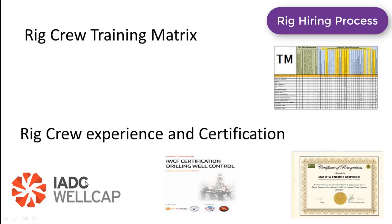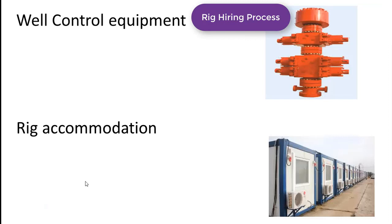The operator will evaluate the crew's certificates and experience, as well as the well control equipment — including the pressure rating and size of the BOP. The operator may also look into the rig accommodation, such as how many portable containers will be used, how many beds are available, and what facilities the rig contractor provides. They will also look at the catering price for personnel staying on the rig in terms of food and accommodation. After evaluating all of this, they will finalize which contractor's rig to hire and inform that company.